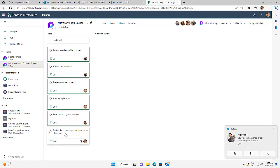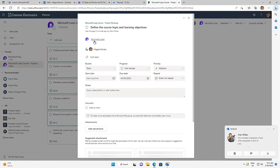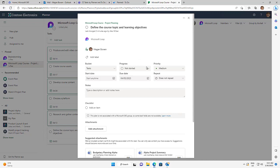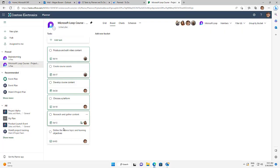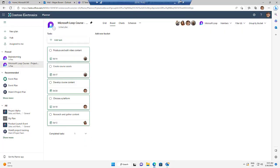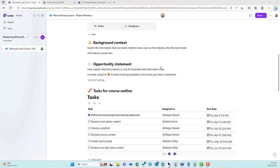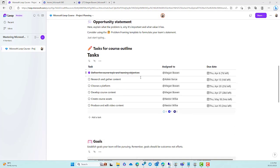Now I'm logged in as Megan. Let's open up this task here — you can see that it's telling me where it's coming from. Now let's actually go ahead and complete this task. Now let's have a look at what happens to the task list in the Loop workspace or on the Loop page. You can see that that task has actually been updated. So it's a two-way integration — we've got the ability to create our tasks in Microsoft Loop and also interact with that inside of Planner.